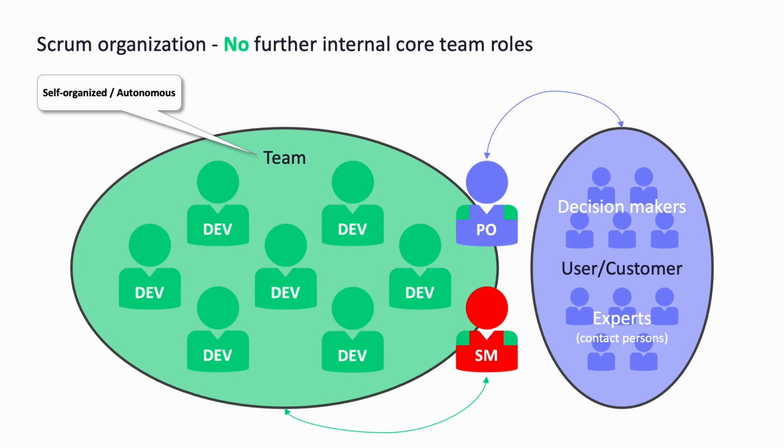However, he does not take on all the tasks himself that would be classically described as leadership tasks, and that means in particular that he does not tell the team members what they should specifically do or who gets which tasks and how these are to be carried out. In the sense of Tuckman's authority matrix, the team is not manager-led by the Scrum Master, but self-led or even self-designed. And as a goal, there is only the prioritization by the PO.